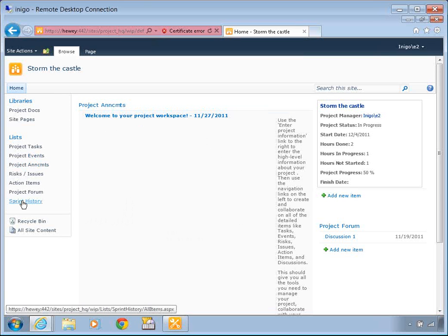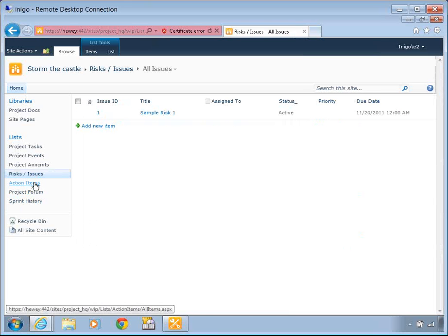We have sprint history. You keep track if you're doing a Scrum methodology and you're planning sprints and executing them and want to track them across time. Discussion boards, action items. Risks and issues are something that we devote some time to in the video series as well. Project management is a lot more than just the tasks. You have to communicate with the team. You have to identify potential risks that may come up, potential issues and the risk associated with those, and then prioritize them by how likely it is to happen and how bad it would be if it did happen.